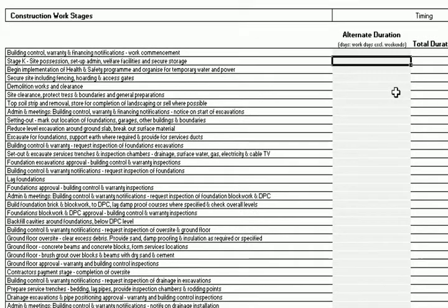And there are other aspects of the Sirca model that will also be time specific, such as the procurement routes. So procurement is the type of way that we get the project constructed. So we can either do it on a self-build basis, we can use a contractor, we can employ subcontractors, or we can use a package option such as design and build. And these are all important because the way that you approach the construction will change the duration and when you start the projects and how you organize or project manage the actual projects itself.